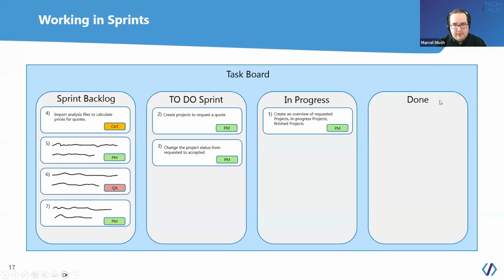Okay, and we do this in sprints, so we have smaller manageable tasks. We usually share those boards with the customers as well, so there's transparency on where we are in the project and what's been worked on already. In the team we have the Scrum Master, and we have a daily meeting called Daily Scrum, where we can clarify what the progress is in the team. And if any holdups come up in the process, anything that's unclear, we directly engage with the customer. That's what Patrick has also mentioned, because we don't want to implement something that might not fulfill the requirement.